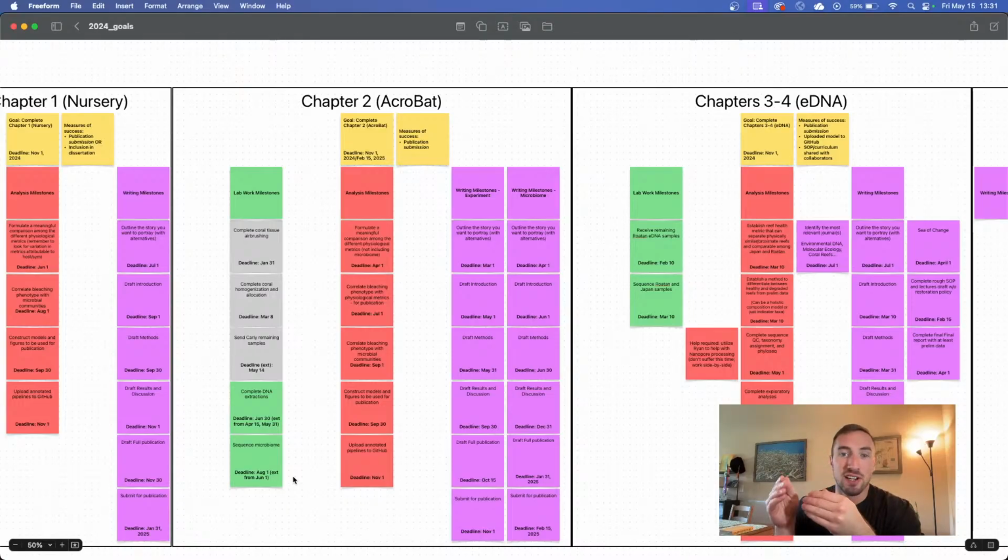And then you need to figure out what to use to generate that data, what experimental methods. Plot those out. How long is it going to take to do that? What resources do you need? What tasks are involved? Do you need permits? Do you need equipment? Do you need a miracle? I don't know. But these are the things, like, you build backwards.